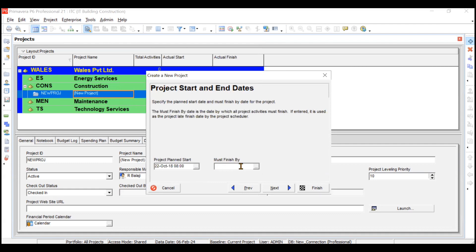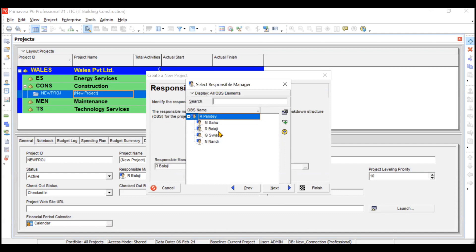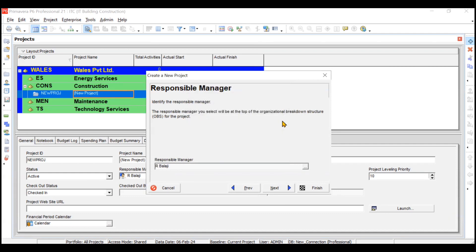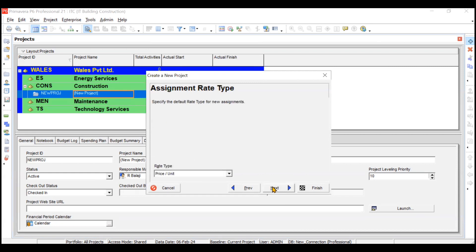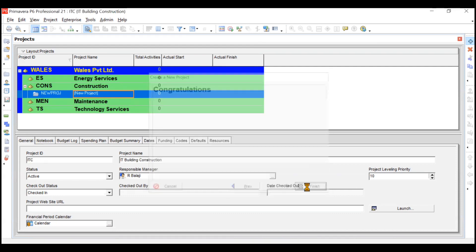For Must Finish By, the presentation gave no constraint, so we'll leave it blank and click Next. For responsible manager, it's R. Balaji - since no person is assigned under him yet, we'll keep it as R. Balaji for now and change it afterward. Click Next. For price type, the default is Price Per Unit - we won't change this. The congratulations message is displayed, meaning our project has been created. Click Finish.